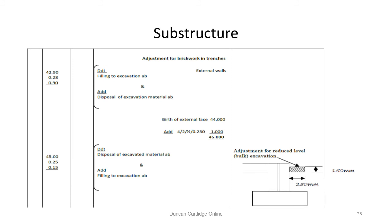Starting with the girth of the external face, 44 metres, add 4 times, twice times, half times, 250 to arrive at the mean girth.